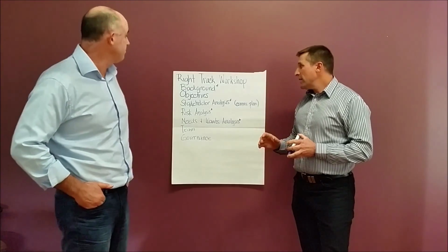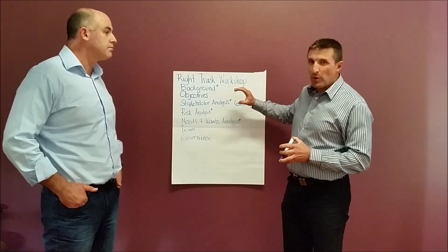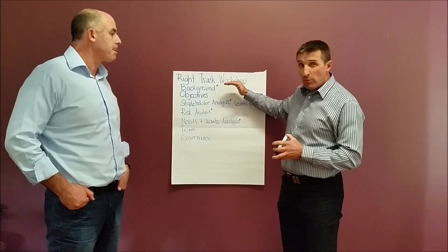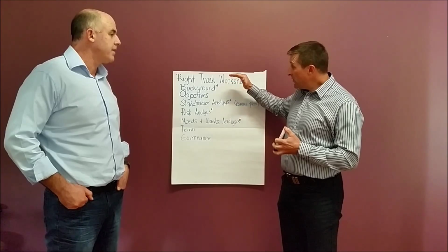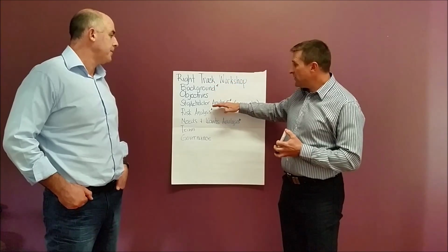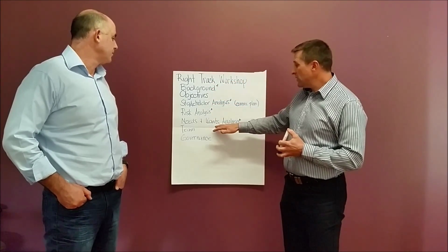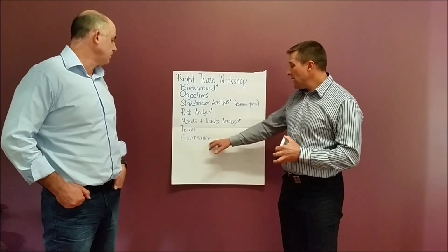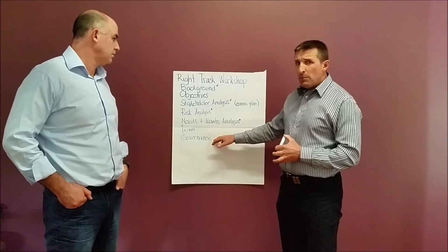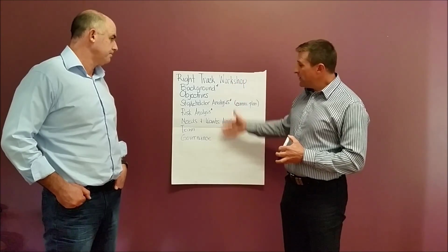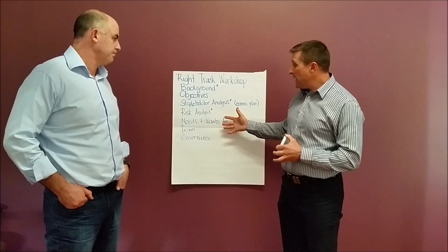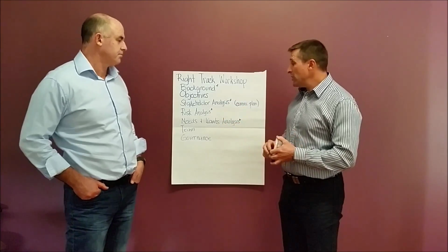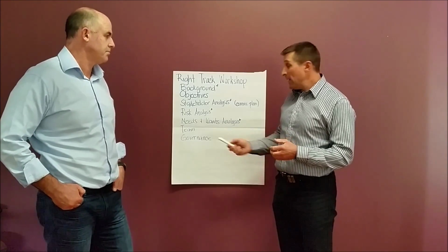Yeah, sure. So from a pure project management point of view, the areas I want to cover off with a client in one of these Right Track workshops is all these things: background, objectives, stakeholder analysis, risk analysis, needs and wants analysis, who's going to be involved, who's going to make decisions, and who has to sign things off. But we do this, it's a 2-hour workshop, and now and then we can't get 2 hours. So to answer Rich's question, if you're only going to pick one, what would it be? And it's this one here.